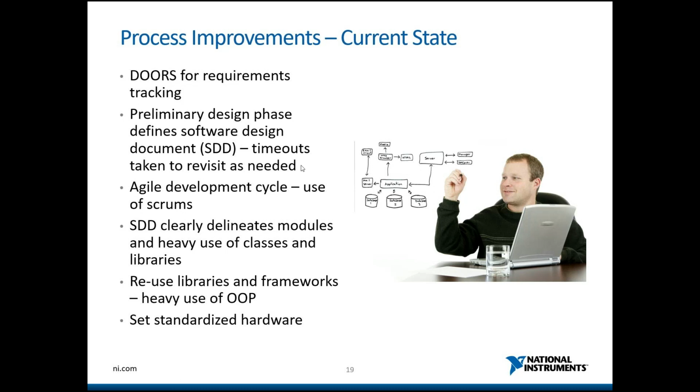So we started doing this agile approach, but before we started coding at all, we would do this design phase where we sat down and we laid out the major modules. And then we would go back and update that as we clarified what we were doing. So in the beginning, it would just say, here are 4 or 5 modules, here's how they communicate, and that's it. And then when we would start working on those modules, we would go back and fill in our design document. So when one of our sprints was to work on the error logger, we'd say, here's exactly what the error logger has to be able to do, and fill in all the details.